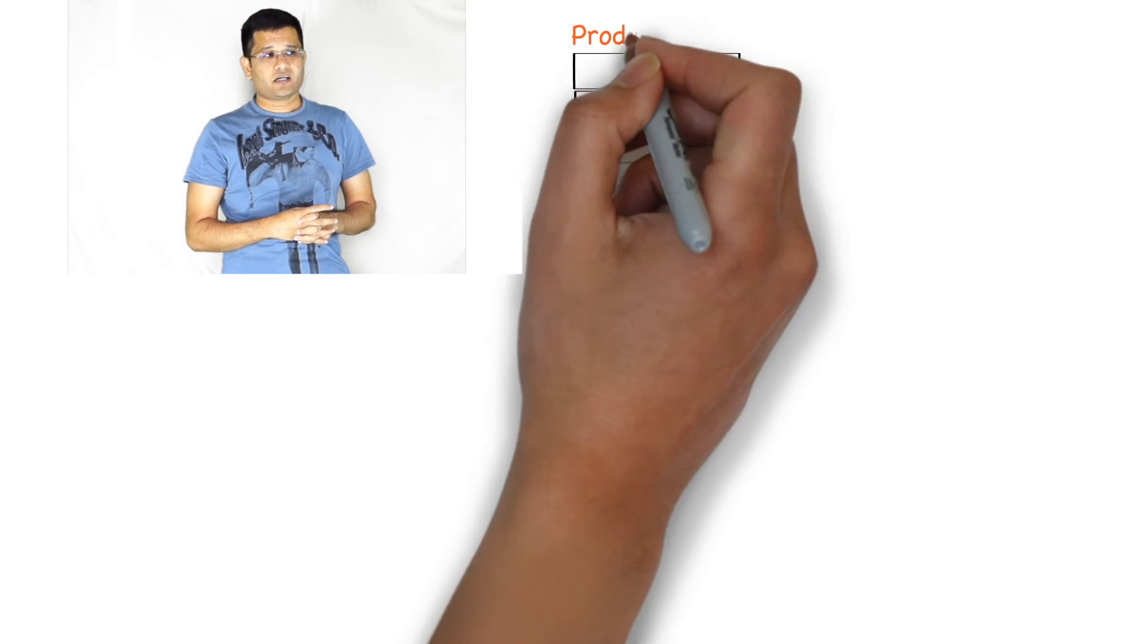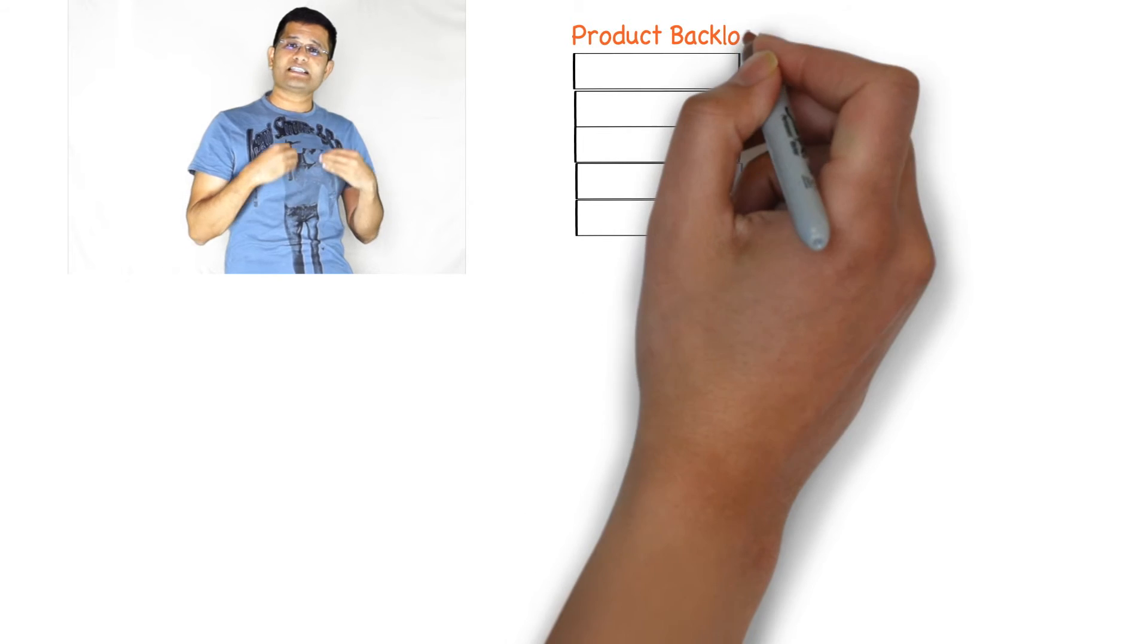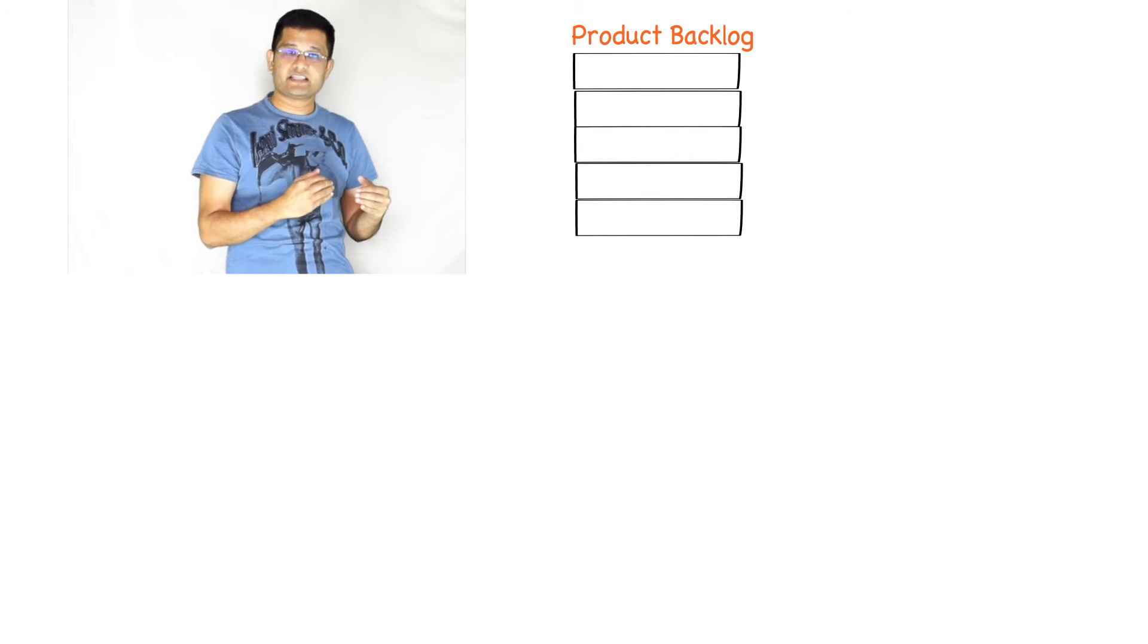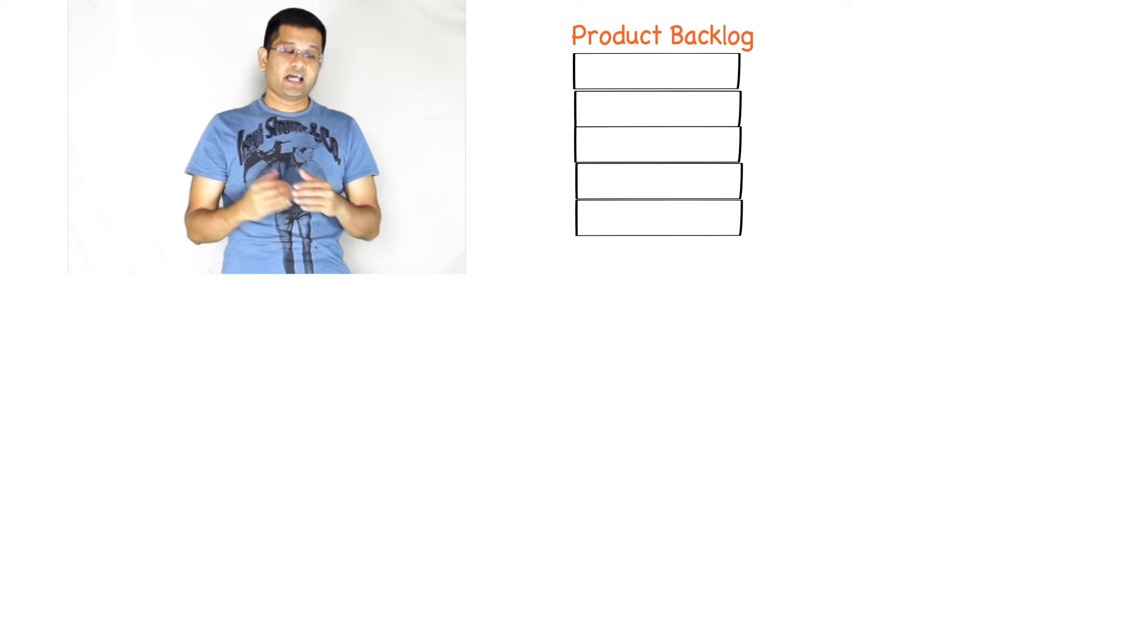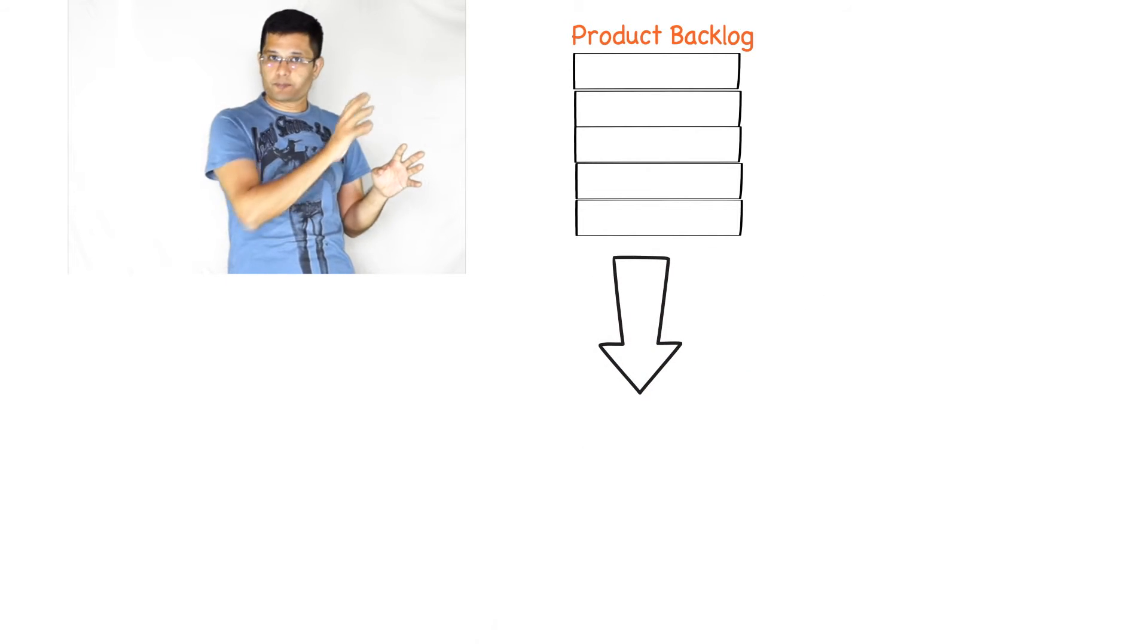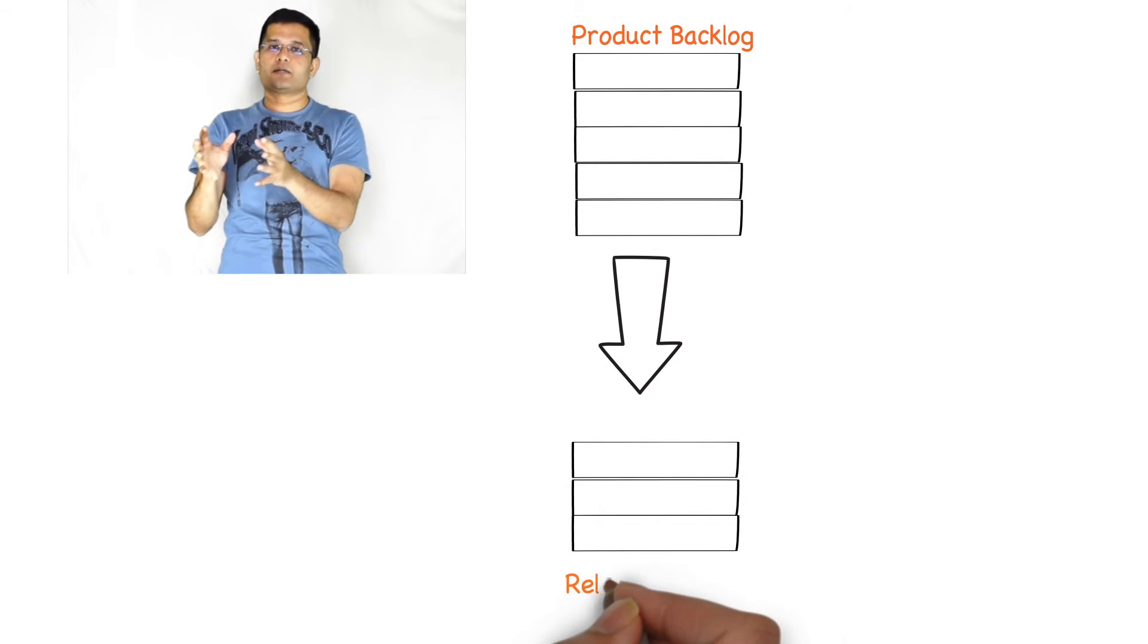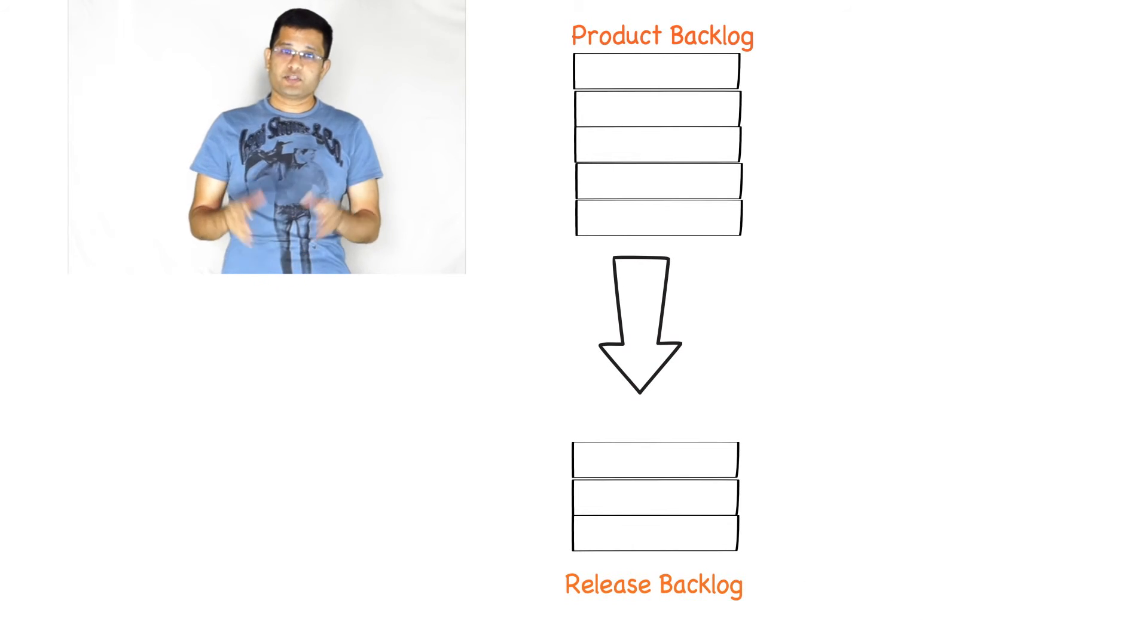Once you have come up with a set of product backlog items, you start thinking, what is the minimum set of requirements that I would need to go to the market? You pick up these requirements from the product backlog and those become the release backlog.